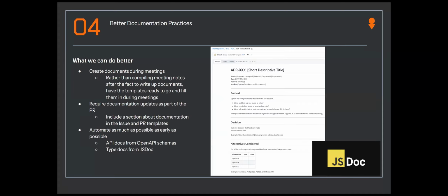Finally, documentation tended to lag behind implementation. Capturing notes during meetings instead of after, requiring documentation updates in every PR, and automating what we could, like API docs, would have kept everything more up to date.